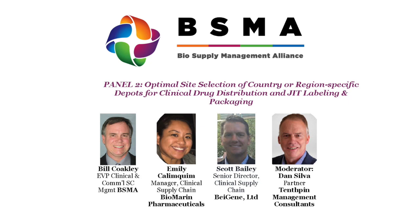So here we are scrambling because the CRO is telling us a bunch of people are about to enroll in the next month or two, or maybe three months or so. And you already know, shipping to Brazil, that's already a very long lead time. So we're scrambling, trying to find who can be our partner. We ended up going with the CRO's preferred partner. Do we really know that was a real regulation, or was that just something they wanted because there was some kind of deal for them to partner together? We don't know. We'll never really know, right? But however, we had to go with them.